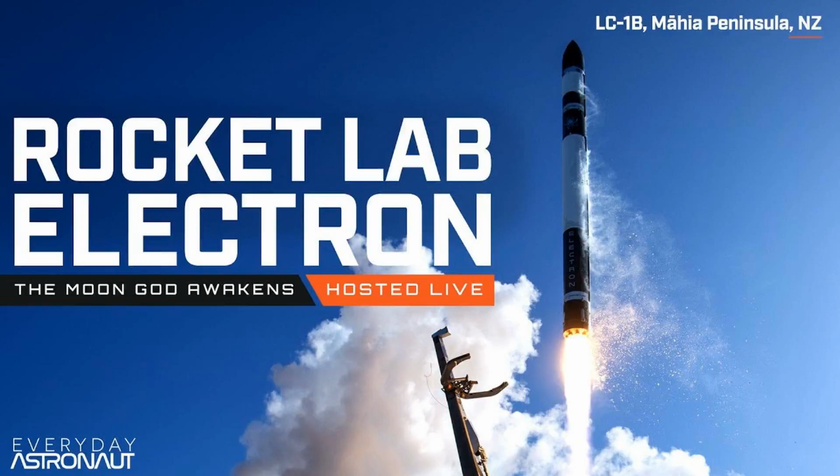2. Boeing's 787 Dreamliner project, 2000s to 2010s. The Boeing 787 Dreamliner was a revolutionary commercial aircraft project that aimed to introduce advanced materials and technologies to improve fuel efficiency and passenger comfort. The project was marked by significant investment, approximately $32 billion, and involved a complex supply chain with over 50 suppliers worldwide, emphasizing the importance of strong supplier relationships. Boeing faced severe delays and cost overruns due to challenges managing its global supply chain and production processes. The competition from Airbus and the need to innovate continuously in a rapidly evolving aviation market drove Boeing to adapt its strategies, ultimately leading to the successful launch of the 787 in 2011.